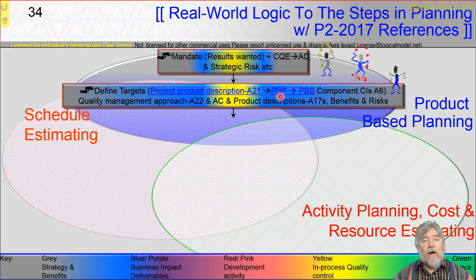And we can see that either in a work breakdown structure dictionary, PMBOK terminology, or a product description, Prince terminology, or the definition of done, or a component of the definition of done, Agile terminology. Because definition of done in Agile would include everything, right, like training. It's the whole holistic thing in order that the product can be usable, not just the project can say it delivered it.